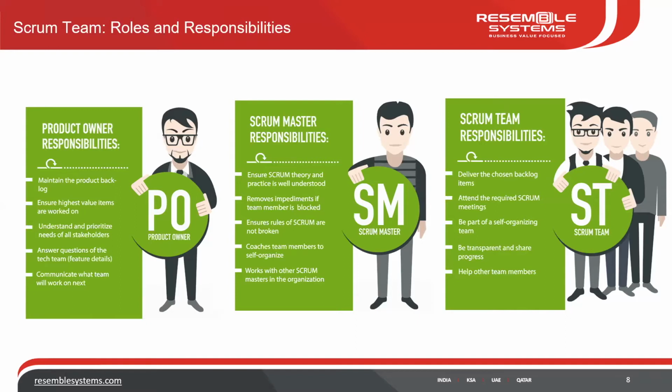For example, the release is planned after 2 months, when the first version of the app is launched. What are the first few features? Then maybe release 2, which happens after 6 months. Maybe we can look at having something like a loan application, knowing your credit score, something like that. So he divides the entire requirement into different parts. The requirement here in Scrum is called the backlog, right? He's solely responsible for maintaining this.